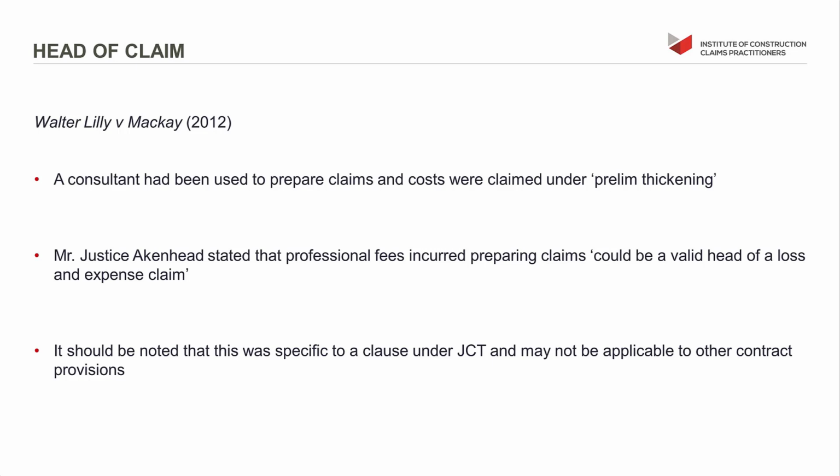If you try to recover your costs in one way within your submission to your client, and then by the time you go to arbitration, you've turned it around and you're looking for a different claim, or you have different justification for your claim, it's unlikely that the arbitrator would allow you to recover the costs of the initial claim. You also need to be sure that the arbitral rules and the law of the arbitration are such that you're entitled to recover your costs of the claim.